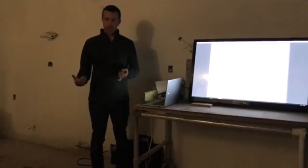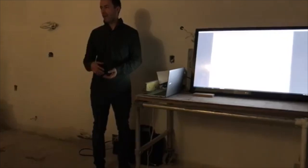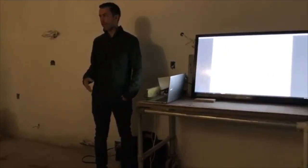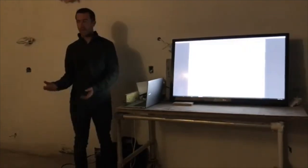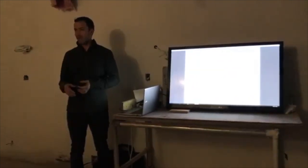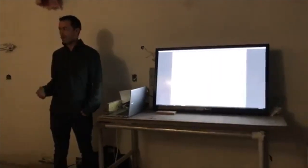We're adding 1 unit to begin with, so where there was 1 house, we're creating 2 units, and then there's the option to do that again in the future, subject to certain criteria that we can plan for as a future project, but it's really doing it 1 at a time, and that steers clear of development charges that are really for big developments of new builds or condos, where the city recognizes that you're adding value to the city, which is great, but they also want a piece of that value and a charge. And these charges can be quite exorbitant, in the 60,000 range for a 2-bedroom unit or something like that.